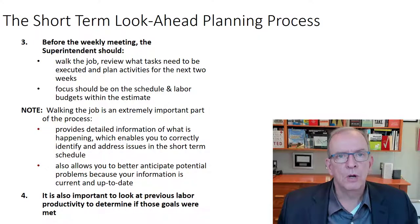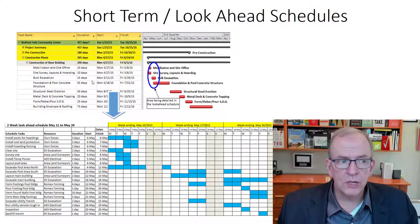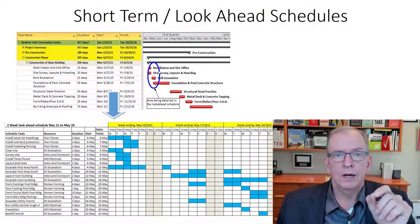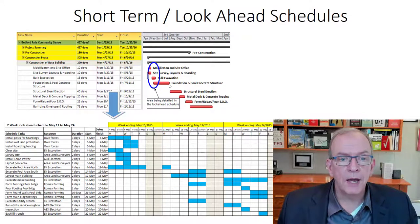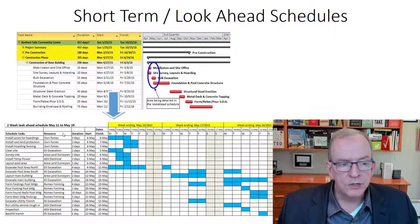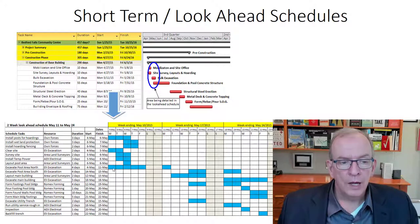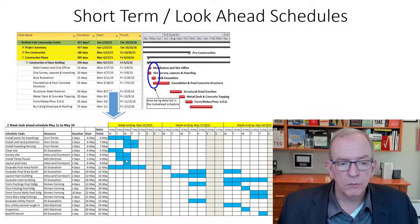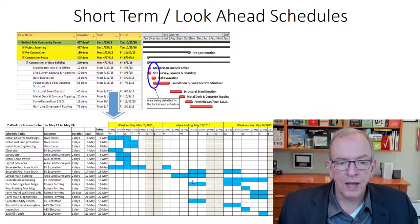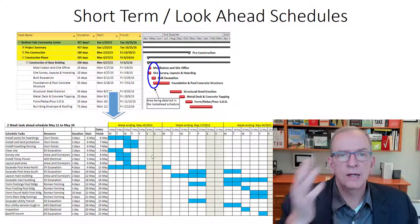Having discussions with those trades early on, as early as possible as you take notice of these things, will definitely help you to be more successful. What you're really doing is taking your baseline schedule and filtering out information for the work coming up. If it's a two-week look-ahead, you'd be filtering out two weeks of work and detailing that really finely. You have to know what just happened — a two-week look-ahead is looking two weeks forward while being cognizant of what just happened, because if something you thought would happen doesn't happen, it's going to have to be scheduled into this portion.